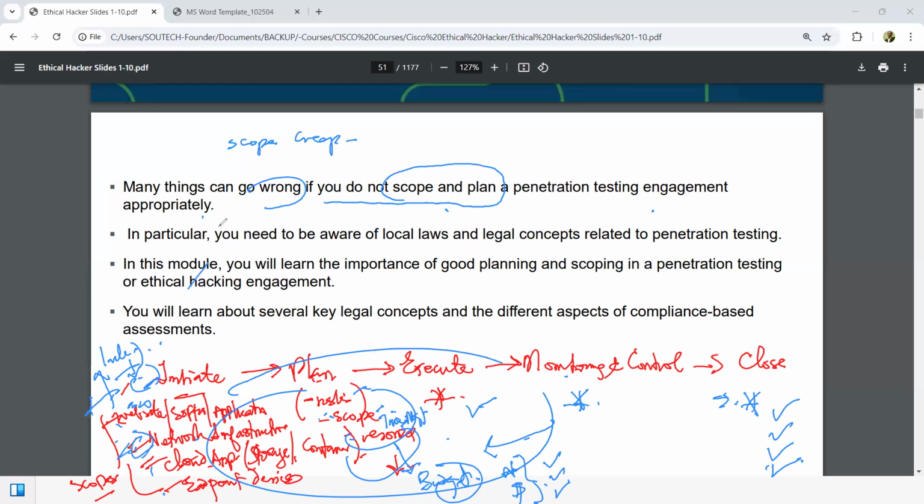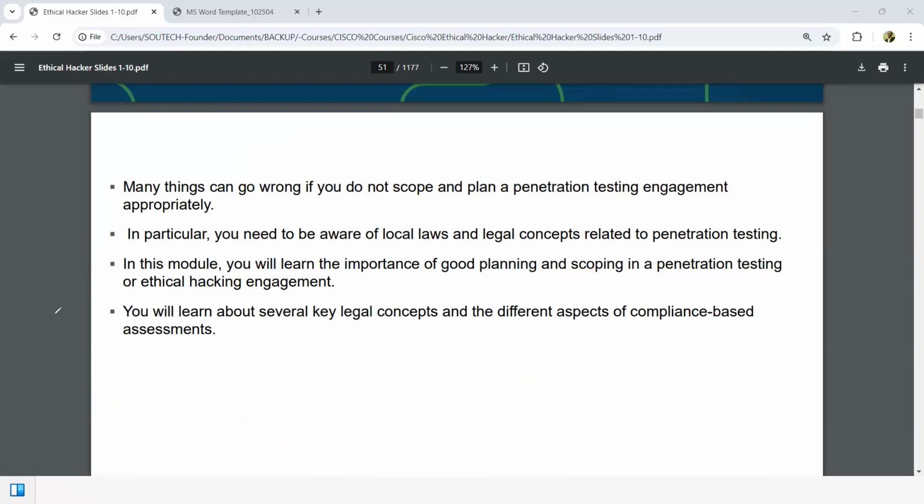So you see that in your mind or in your team's mind, you intended to just do pen testing for one website. But before you start executing, if you don't plan out all of this stuff, you're going to go into a big mess. So of course, if you are budgeting, let's say $1,500 for the project, by the time you start seeing additional scope, this budget is going to shoot to, let's say, 3K. And what happens? You're going to have a lot of issues. So that's why it's very important for you to understand these principles.